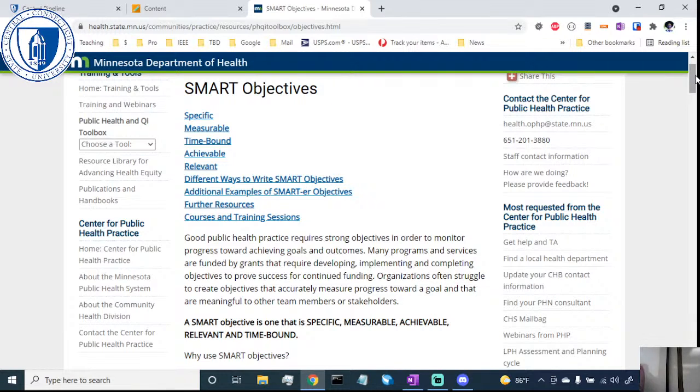And the other thing is, with construction, requirements don't change as much. With software, things can change on a dime, right? So if you have this big requirements document up front and that's all you're ever going to do, getting that changed is difficult. So people prefer to work towards initially a minimum viable product, something that does a bit of what the customer wants, and then iterate from there to get the product better.